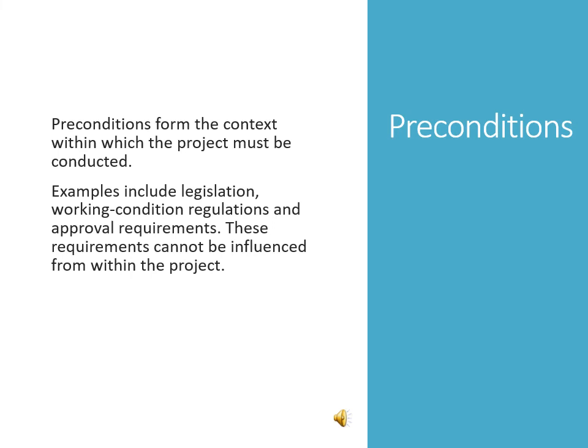Preconditions form the context within which the project must be conducted. Some examples include legislation, working condition regulations, and approval requirements. These requirements cannot be influenced from within the project.